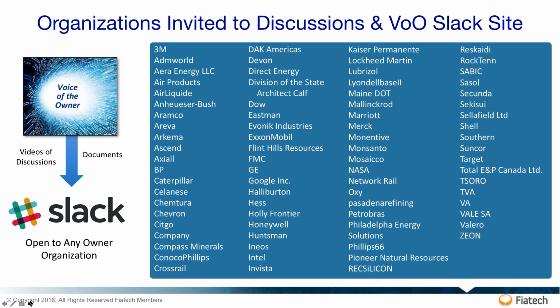And so you could see a scenario with respect to Fiatech where you have the impact of ripple effect change orders, where you aggregate multiple models that are used by multiple different EPCs to price out change orders. You don't load it with numbers because you can't do that, but you say these are the kinds of influences and activities that surround a change order that gets costed in. Then, if it comes out of Fiatech, you basically have this independent broker that provides a solution. So any owner or any EPC can use this tool, for example, to anticipate the impact of a change order and decide whether or not it seems to be in line with the cost that they receive from the EPC for the change. Does that make sense?